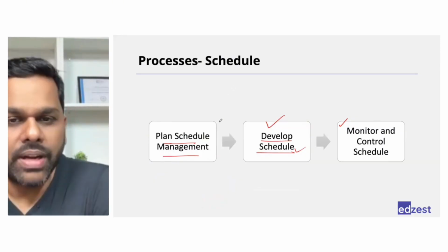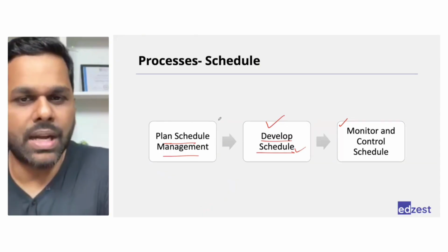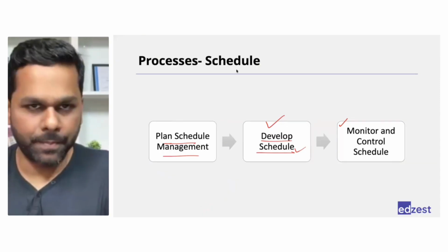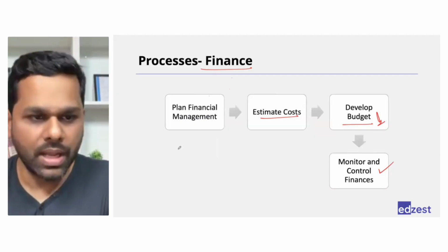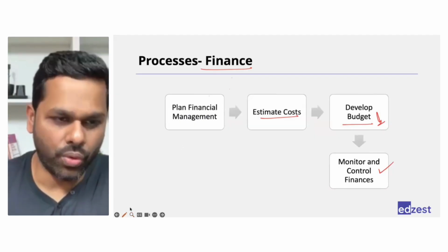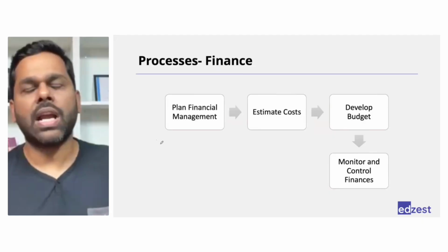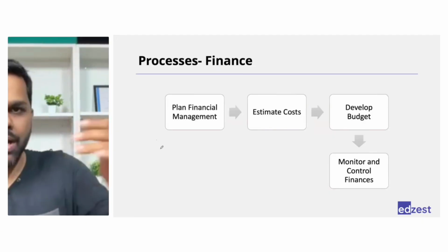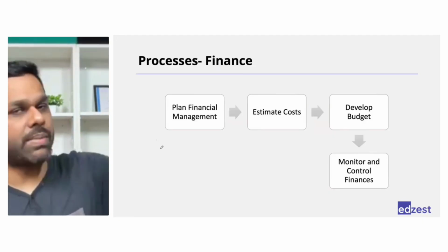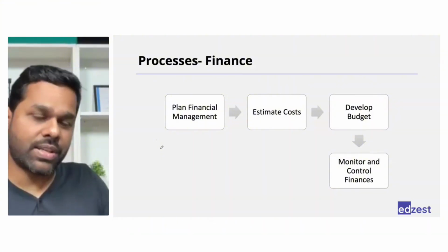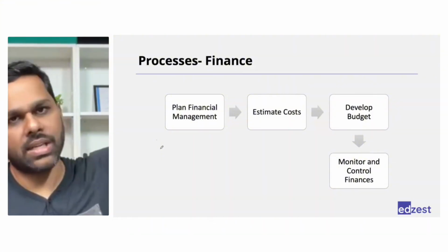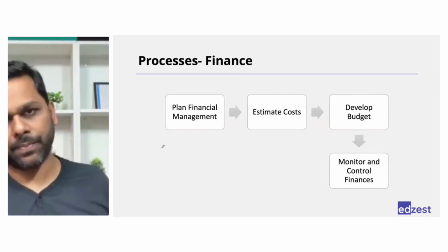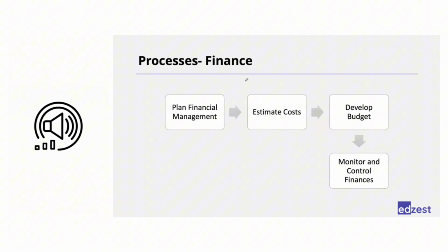Another question, when we define the scope, we define the acceptance criteria as well, right? Yes, absolutely. So whenever you define the scope, you also mention what the acceptance criteria will be so that the team will know how and what they are supposed to build. Once they build it, they will test it according to the acceptance criteria themselves. The team will first test it, and then they'll go to the customer to ensure that the customer will also test it according to the acceptance criteria. Yeah. So answer to your question is yes.